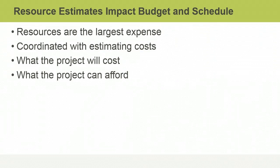Most projects work with a limited budget for an ideal set of resources. Because different resources have different price tags, you need to determine what resources your project can afford. For example, can the project afford an architect whose rate is $100 per hour, or will you have to go with the slightly less qualified architect who charges $75 per hour? Alternatively, you could schedule the more qualified architect for 60% of the required work and the less qualified architect for the remaining 40%.